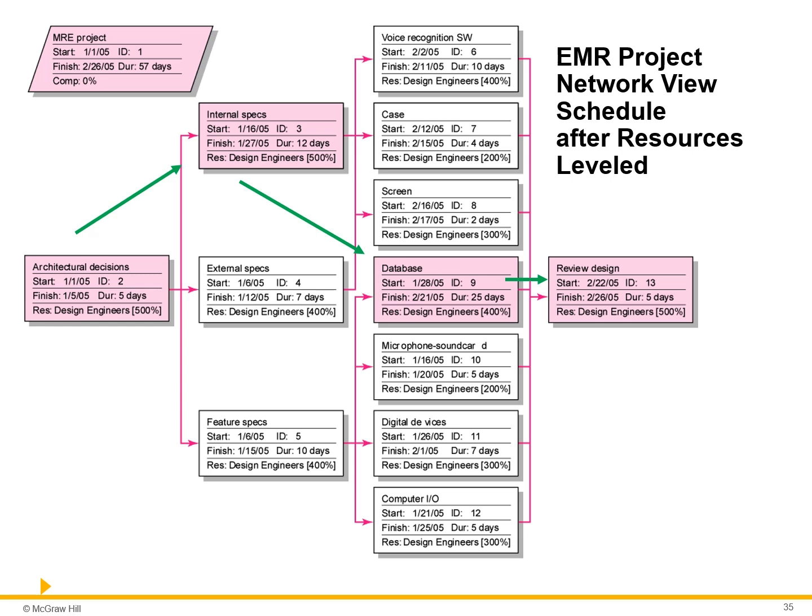However, as expected, this does not solve all of the allocation problems. The next option is to allow the software to apply scheduling heuristics and level outside of slack. The new schedule is contained in the revised resource-limited network chart presented in the next figure. The resource-limited project network indicates the project duration has now been extended to February 26, which is 57 workdays, versus the 40-day time frame.